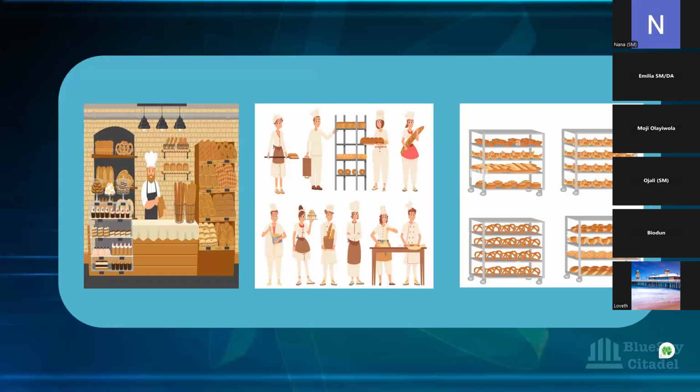And you're looking at the team and the product owner. When it might be an enhanced feature, okay? When does the client want this thing? Or the timeline is by the end of August, they need it and all that. You're talking to the tech lead. Where are we? This work that we were taking in, this goal that we were taking in, what do we need to do? Tell me the breakdown. They've told you the breakdown. Who would be needed? Is it just the Scrum team to do this? Or would we need more than the Scrum team to do this?